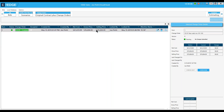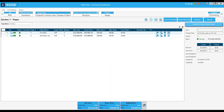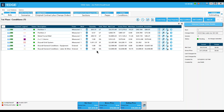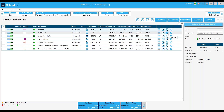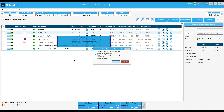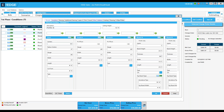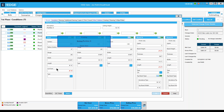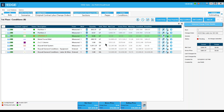I can double-click to navigate into sections, move to pages, and move to conditions. What I'm seeing here is my original bid with all the conditions that are part of it. For this particular change order I'll use one condition that's already in the bid, and add a new one that is not currently in the bid. To do that I'll copy one of the existing conditions without its quantities, rename it, and make a minor change to it.